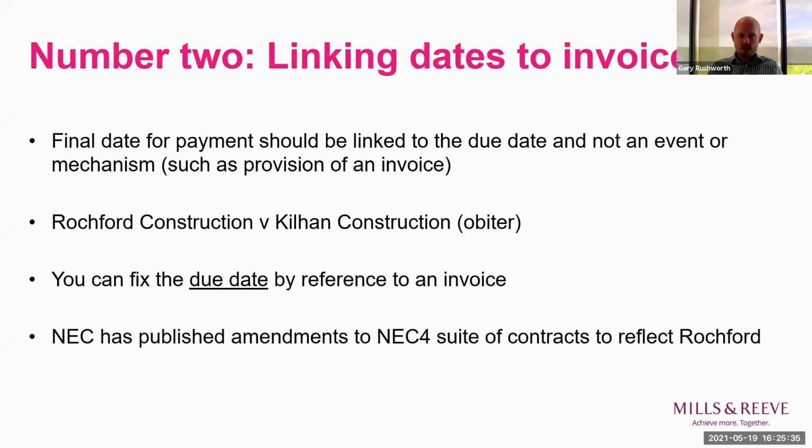And that's exactly what the NEC has done. So shortly after the decision in Rushworth, the NEC published amendments to the NEC 4 suite, which provided for the due date to be the later of the receipt of an invoice or 14 days from the assessment date. And then the final date for payment follows on a specified number of days from the due date. Before that, in some of their contracts in the NEC 4 suite, they had linked the final date for payment to an invoice. So they changed that to correct it.